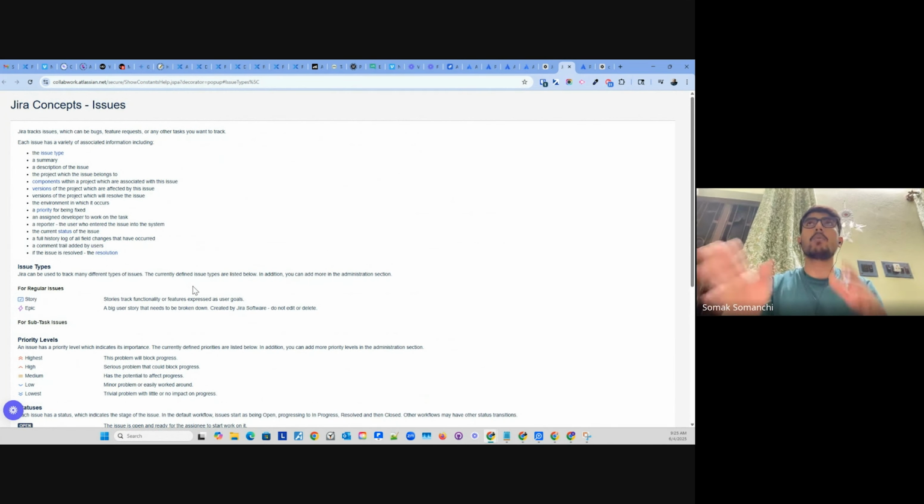And that way we can have, like what the user is telling in the video, basically 4 to 5 swim lanes. Swim lanes is like the column, and as you can see in his demonstration, this is the to do, progress 1, testing, and done. Ideally this changes for all the projects, right? So in collab work we'll have some different staging, but the thing remains the same.